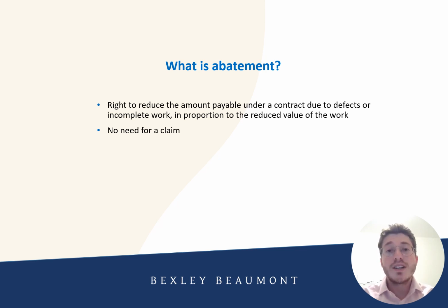Abatement is the right to reduce the amount payable under a contract due to defects or incomplete work. Essentially, if the contractor's work is substandard, the client can pay less. But, and this is the important point, only in proportion to the reduced value of the work. So essentially, the purpose of abatement is to ensure that the employer doesn't overpay for work that doesn't meet the agreed standards. So let's look at an example.